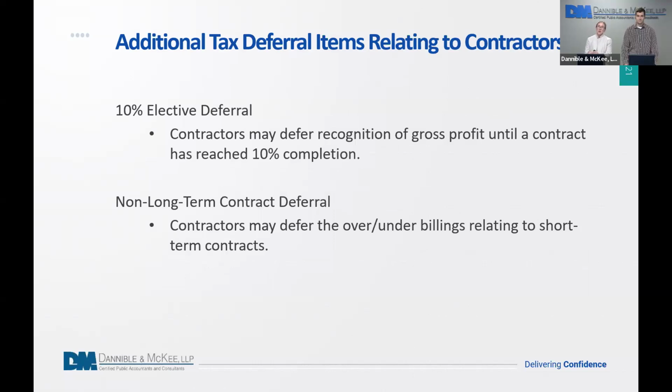Another method would be non-long-term contract deferral. A non-long-term contract is a short-term contract. On those jobs, contractors could defer the over and under billings related to those short-term contracts.